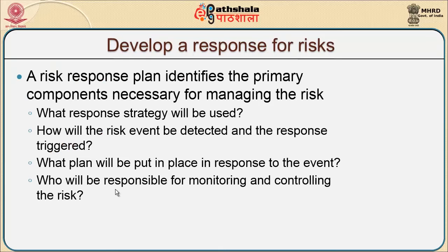How are we to develop a response for all these risk factors? If we are to mitigate, how are we to develop the response? This identifies the primary components necessary for managing the risk: what response strategy will be used, how the risk event will be detected and the response triggered, what plan will be put in place in response to the event, and who will be responsible for monitoring and controlling the risk. This is a list of questions prepared in the beginning, and if we can arrive at an answer for all of them, then the response can be easily fetched.